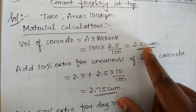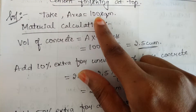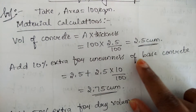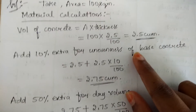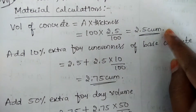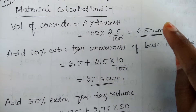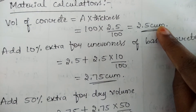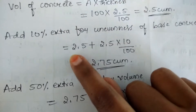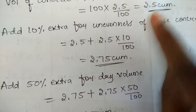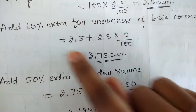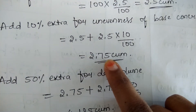That gives you the volume of concrete for an area of 100 m². Then for the same volume we have to add 10% extra for the uneven surface of the base concrete. That means 2.5 will remain as it is and extra 10% we have to find: 2.5 plus 2.5 into 10 divided by 100. On simplifying the whole thing we will get a value of 2.75 m³.